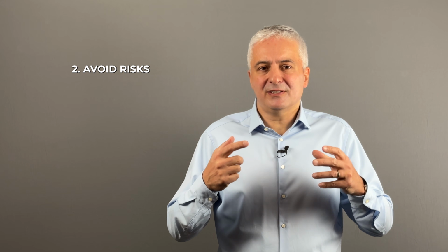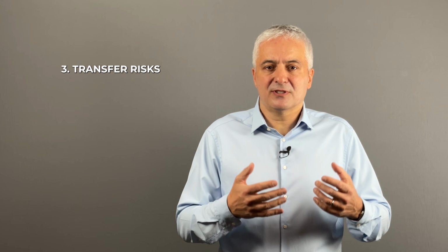You can also avoid the risk by basically changing the way you do things in your company. So let's say that you have your employees who are using their own devices when working remotely. And if you find that these risks are simply not acceptable, that they're too high, you can actually tell them that they will have to use company devices to work remotely, and therefore you simply avoid the risk of their using their own devices.